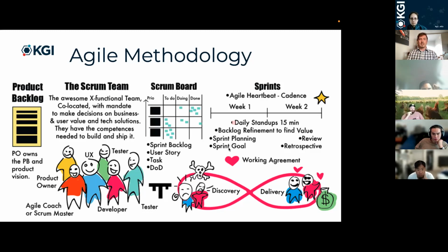We go through what our goal is at the end of the sprint, knowing that this is variable. We're not saying, hey, we have to get these 10 tasks done. We're constantly reanalyzing: is our original thought of what that goal might be still achievable, or do we need to focus on maybe one or two instead of 5 things, so that those 1 or 2 things look great and reflect the needs of our user?